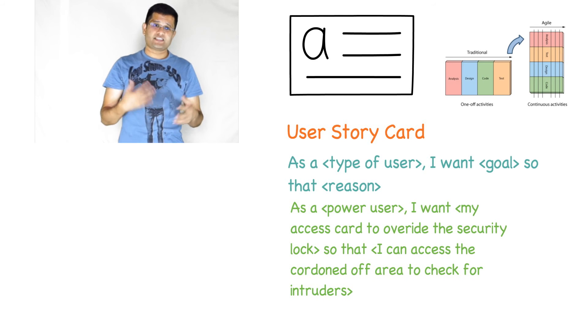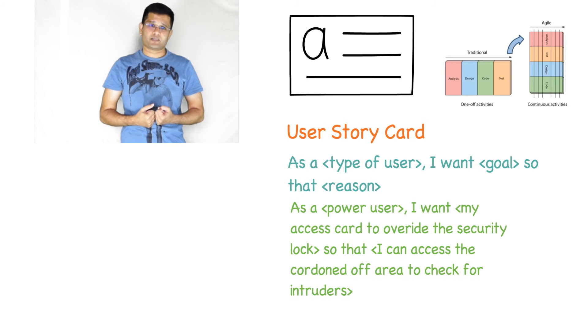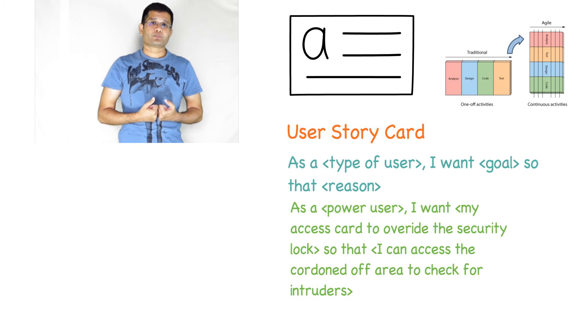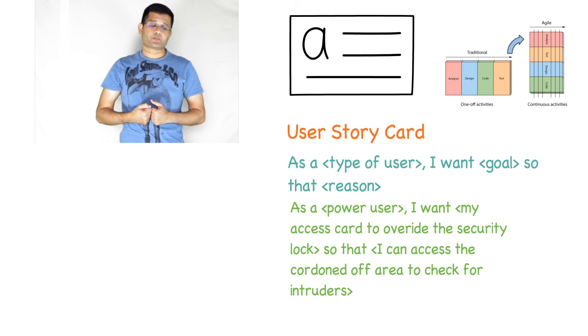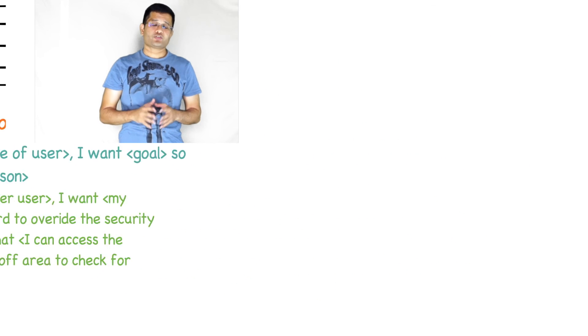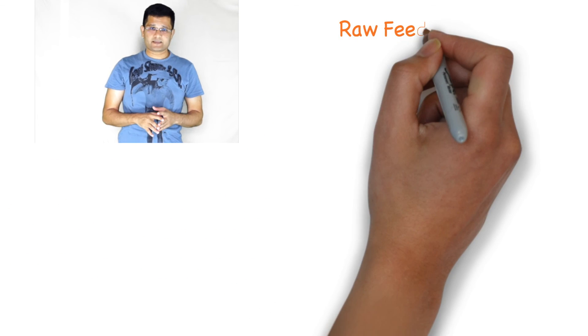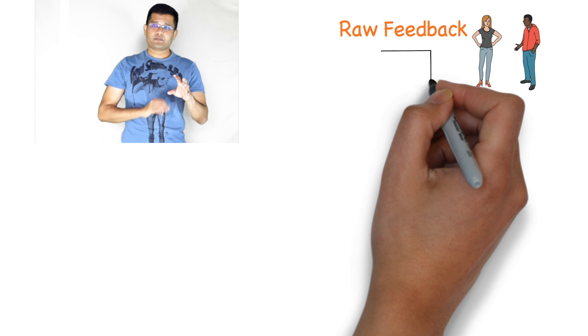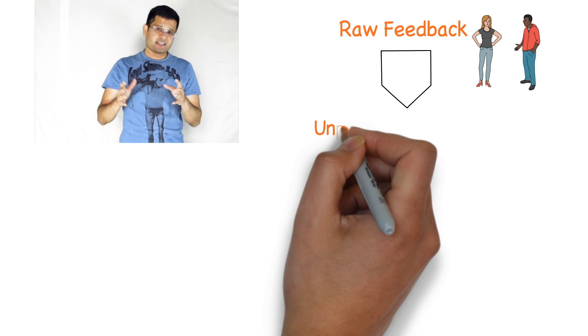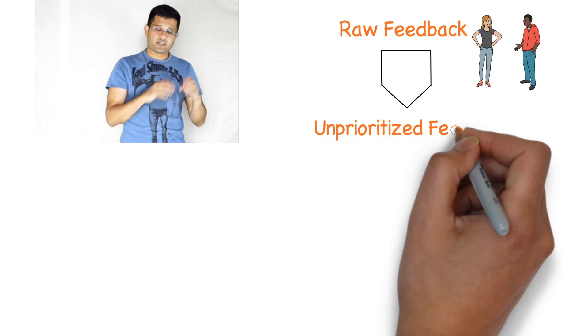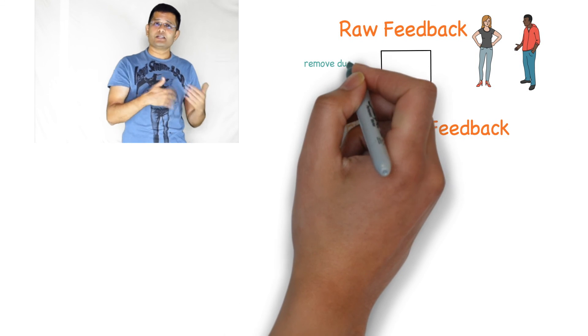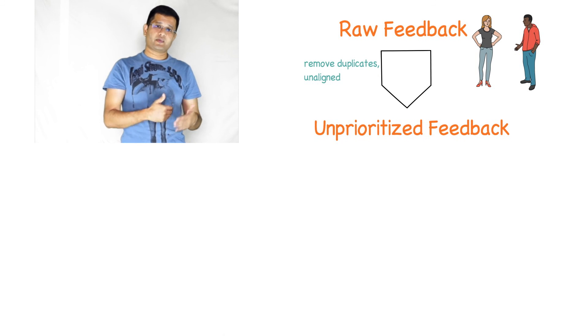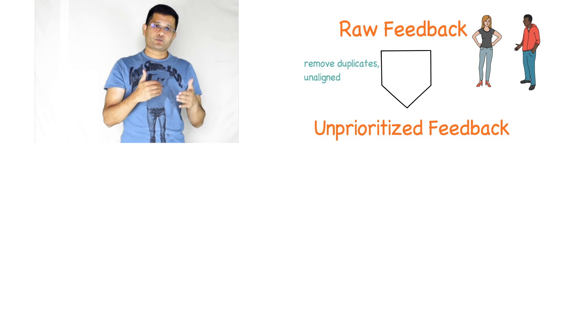It may become very difficult for you to prioritize and put items into the product backlog on the run. Usually people stage the feedback to three levels. One is the raw backlog where people may be logging into tools. The second is the unprioritized feedback where you look at these raw feedback, you eliminate duplicates and you just pick up those which you think are valid to the vision of the product.